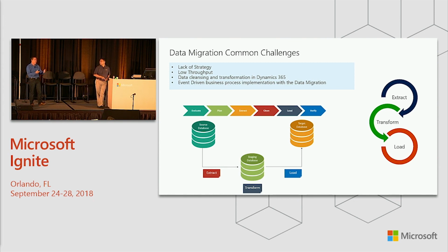So that's a creative strategy that we've used in the past to say we don't have to migrate 6 million records over this weekend. We really only have to migrate 1 million of them, because 5 million of them are just old reference data that can just be stale. So it's really data migration 101.